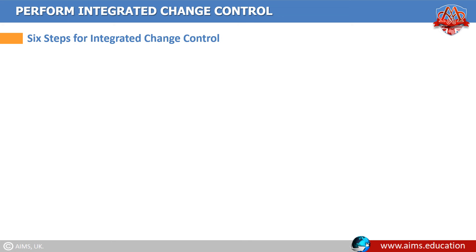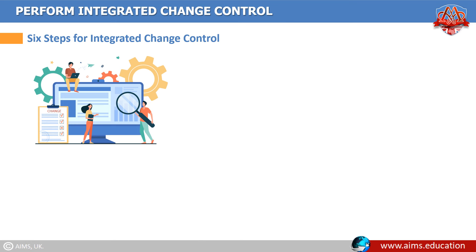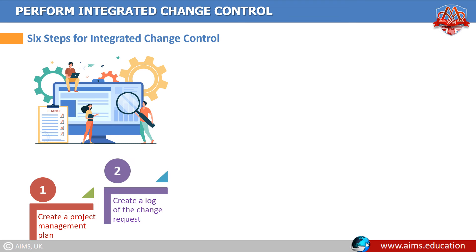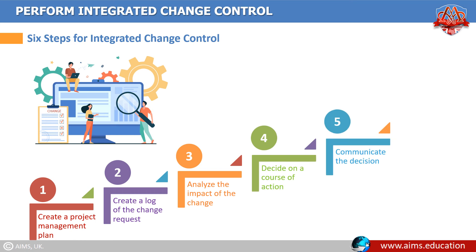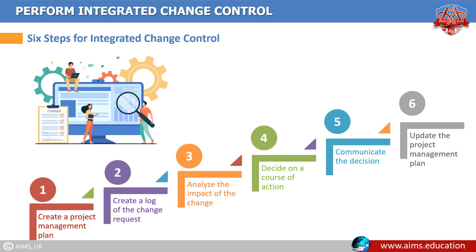Here are six steps to implement an integrated change control process within your organization: number one, create a project management plan; number two, create a log of the change request; number three, analyze the impact of the change; number four, decide on a course of action; number five, communicate the decision; number six, update the project management plan.